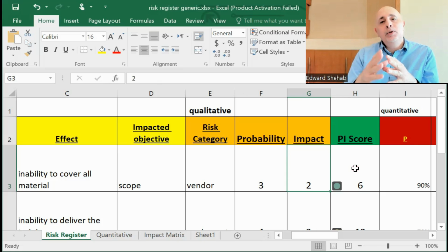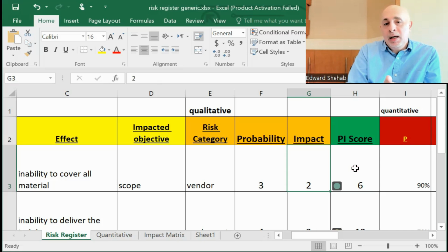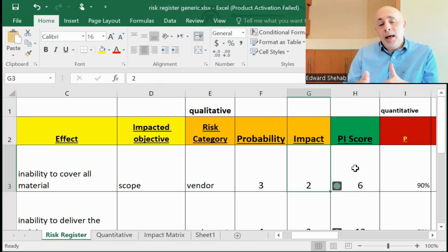You need to find a way to go around these risks, either to fix them, avoid them, or something. And I'll tell you about the strategies that you'll use. So they need to be fixed, and your project plans need to change to reflect what it is that you fixed. If they are yellow, then they need to be actively discussed in your weekly meetings or monthly or whenever you meet for this project, status meetings.